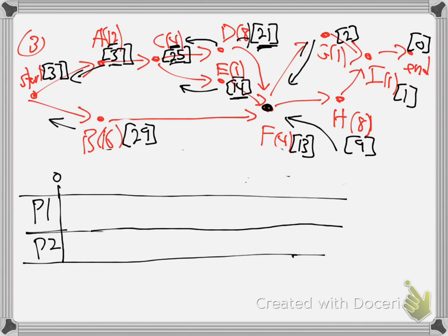So it's 37. So here's the other mistake students make. They'll go, okay, here we go, and they'll put A all the way over at 37. No, no, no. 37 is just the path. A only takes 12 hours, right? Right there. So A is just a 12-hour job. Don't get confused with that. So 12. 1, 2, 3, 4, 5, 6, 7, 8, 9, 10, 11, 12. So 12, job A. So down here, this guy will do job B. 12, 13, 14, 15, 16. Job B. Processor 2 will do job B, right?